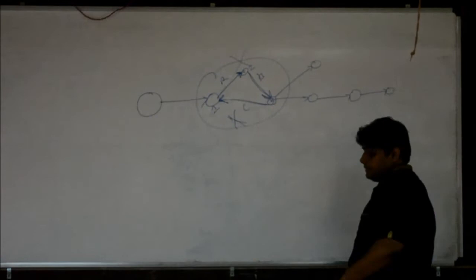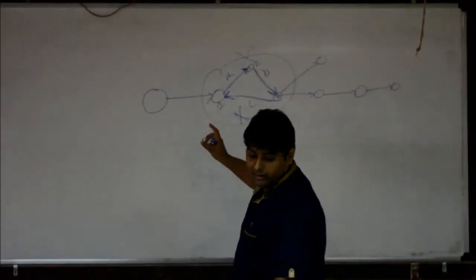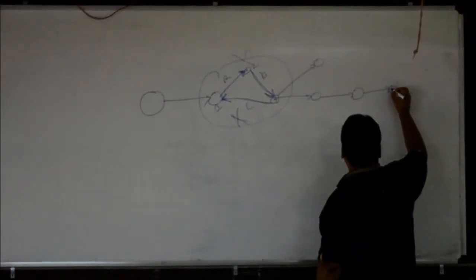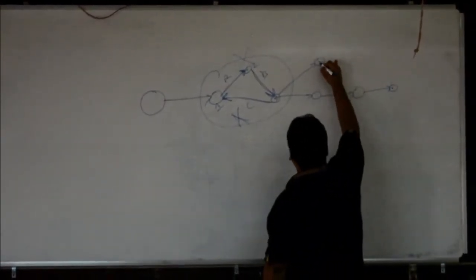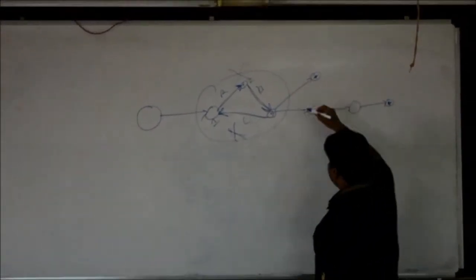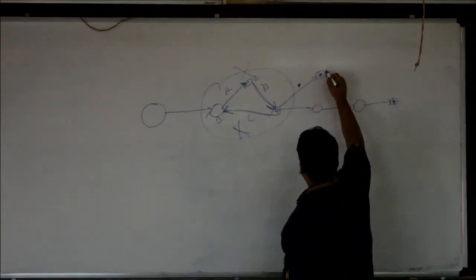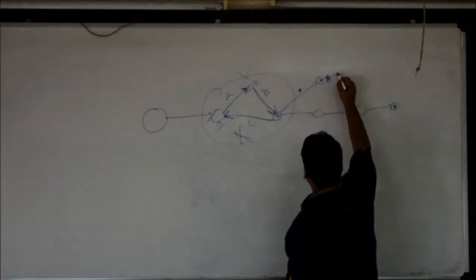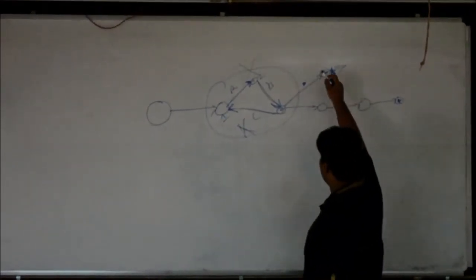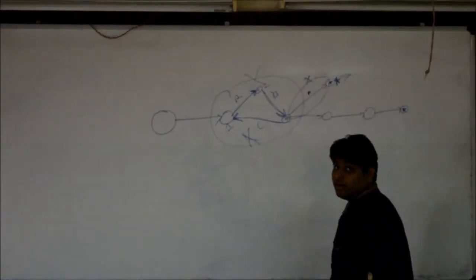Now let's go for dangling. Dangling is defined as an activity which does not have a final activity after that. As you see in this, there are two end events. One end event, and this other end event. After this activity, there is no activity after this event, but there should be one activity for this. So this is called dangling. This should also not occur in a diagram.